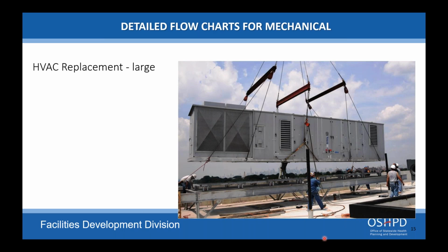The scope of work is going to be exactly that. You're pulling the old one off and adding a new one. There may be minor alterations required due to duct relocations to align with the new unit. A lot of these units are custom and they can work with the existing openings. But this is your scope of work.